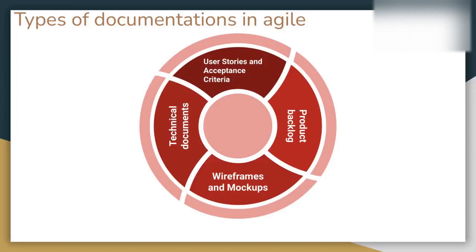The product backlog is considered dynamic because it is a living document — new items called PBIs (product backlog items) can be added, existing PBIs can be modified or removed, and priorities can be adjusted based on changing requirements and business needs. The product backlog is typically owned and managed by the product owner, who collaborates with stakeholders to gather requirements and ensures the backlog reflects the project's vision and business goals. Wireframes and mockups, while perhaps less popular than user stories or the product backlog, can be equally important.